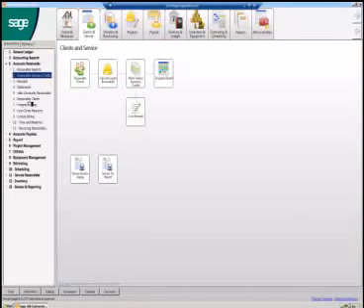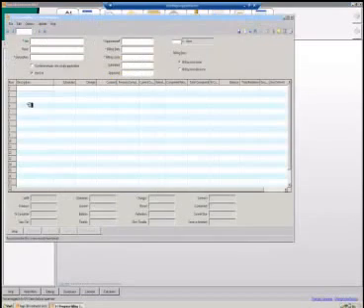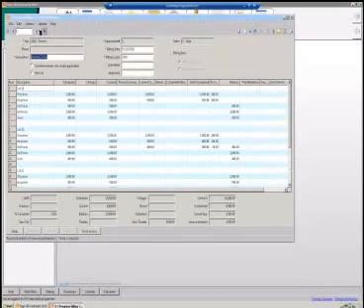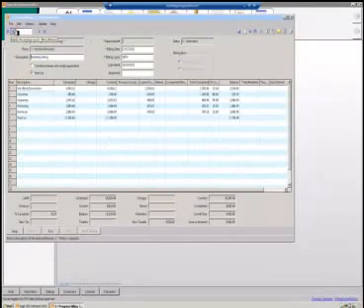In addition, we have progress billings, which a lot of our customers use. I'll just bring one up here real quick. The reason our clients really like this is that this is a progress bill for one job, and it happens to have multiple phases on it, so we're billing by phase. If we wanted to, we can check this box here and combine multiple phases in this one single application rather than billing those separately. Description, this is application number 1, the date, the billing cycle, the date we submitted it, what have you.